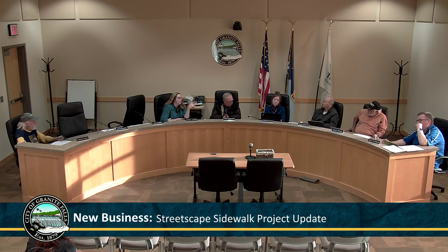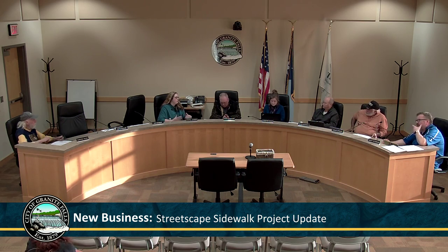The good news is, Jade, they were able to confirm, because the new lights are gonna have different bases, they're gonna pour the different bases since we're tearing up the concrete. That was the other factor in this equation: if we're gonna switch out the lights and update them, now's the time to do it, because otherwise we're gonna be tearing up newer concrete at some point to replace these bases. But they can make the old lights work on the new bases.